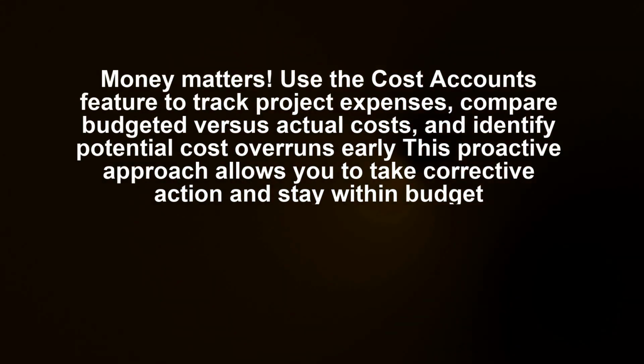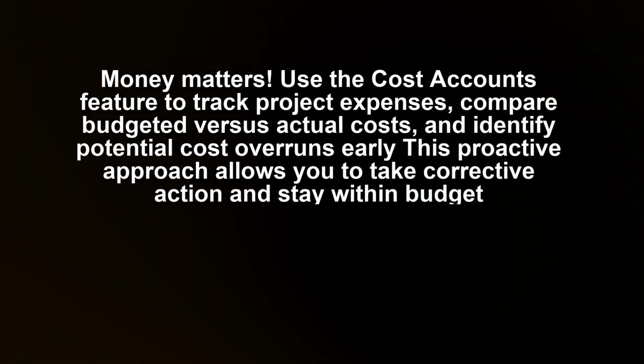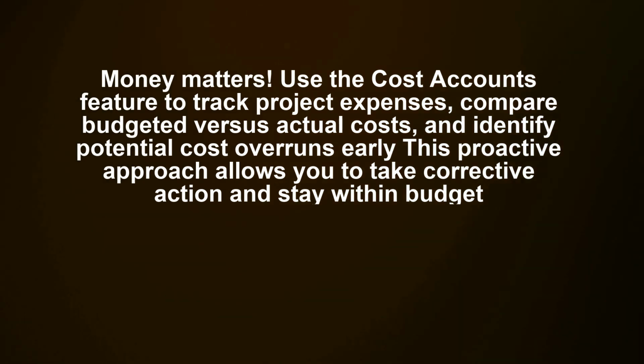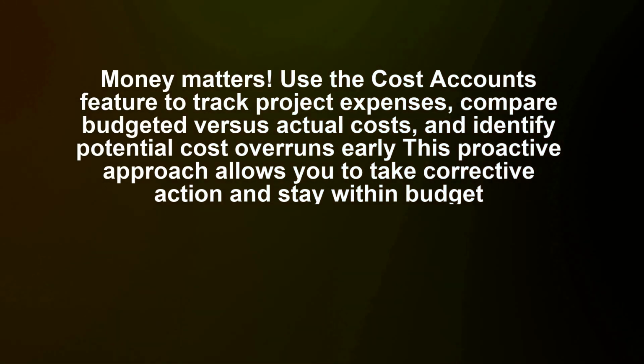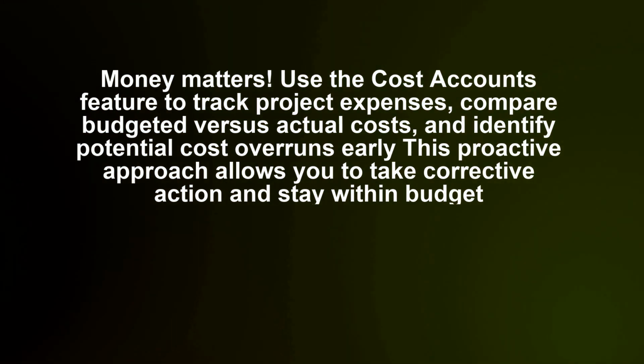Money matters. Use the Cost Accounts feature to track project expenses, compare budgeted versus actual costs, and identify potential cost overruns early. This proactive approach allows you to take corrective action and stay within budget.